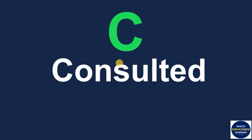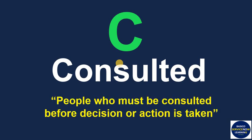The letter C stands for Consulted. We give C to those people who must be consulted before a decision or action is taken. For example, when writing a test case, you need to know which requirements to cover, so you need consultation from a business analyst. We give C to the business analyst — he will be consulted while writing the test cases.